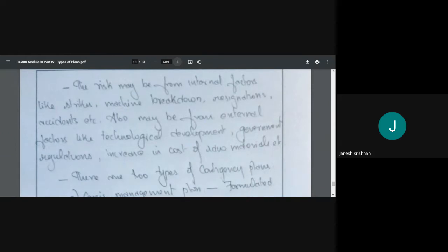Increasing cost of raw materials really affects us civil engineers more, because our projects and plans take some time. Like building a house, or a bridge or road, or other construction works, it will take some time. Whenever before you quote for the job, you prepare an estimate. When making the estimate, we use today's price. Right. So if you take more time, like a project delay, the raw materials price will change.